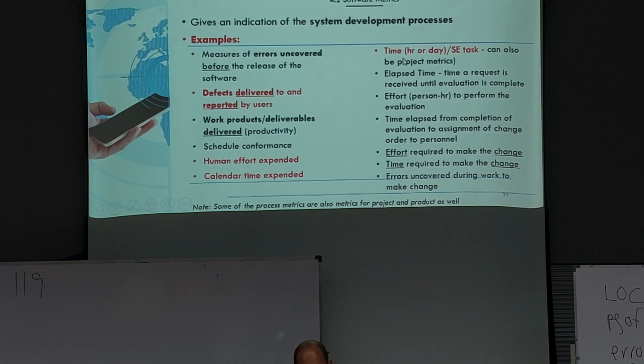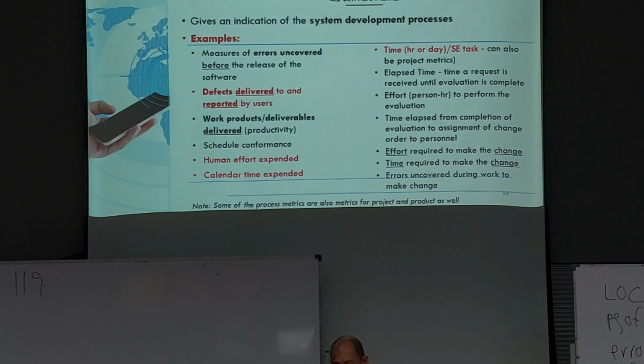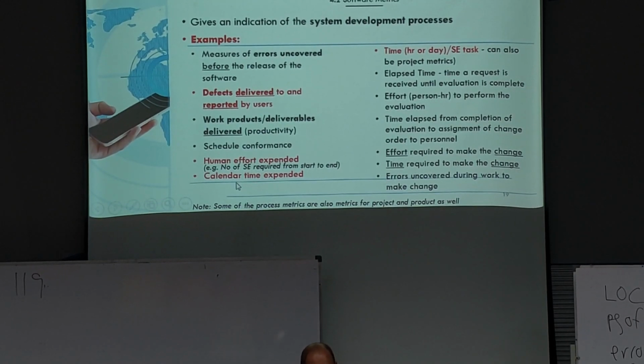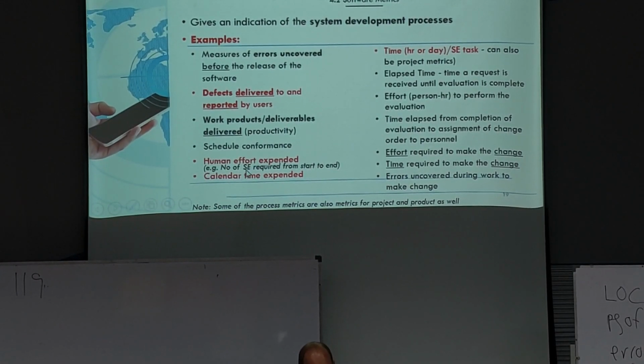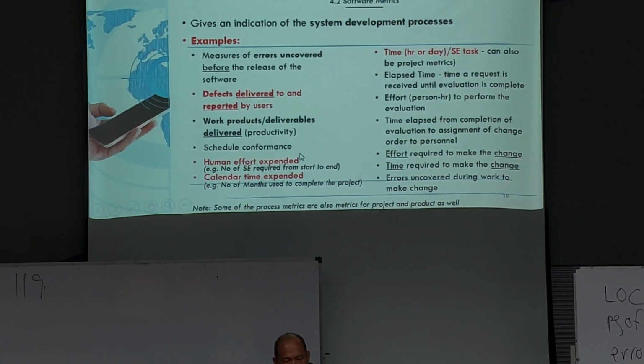Time, hours a day per software engineering task. When you are developing a software, you have to carry out many software engineering tasks. So on average, how much time is needed to carry out one software engineering task? For human effort expended, you may want to count the number of software engineers required from start to end. For calendar time expended, you can count the number of months used to complete the project.